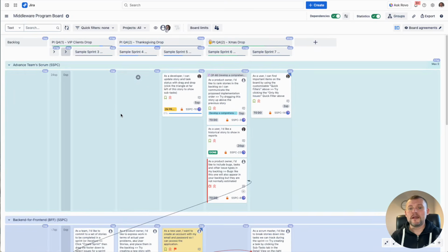To get program planning view, just map sprints to columns, releases to column groups, and teams to swimlanes. This setup allows you to plan and visualize the scope of multiple sprints across the organization, product increments, while taking into account dependencies, capacity, and potential blockers. It's an ideal view for release and PI planning sessions.